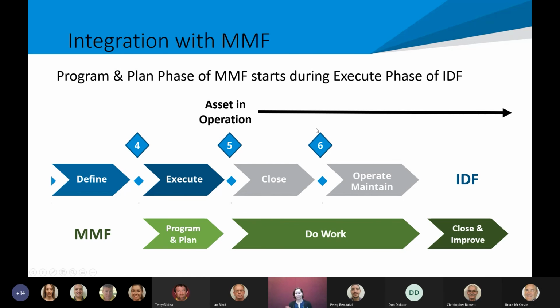And we had a lot of toing and froing of what phase defect liability sits in. Where we landed was that it happens post Gate 6. So at Gate 6, we're closing the project when we've done all of that immediate activity, I kind of call it, and that defect liability period is post Gate 6.